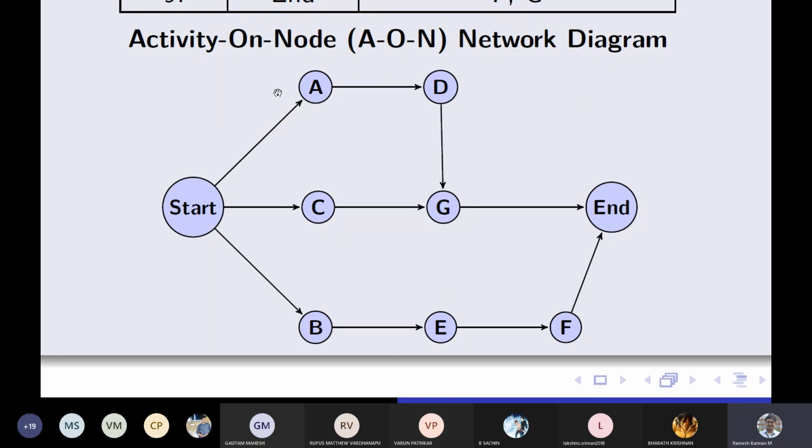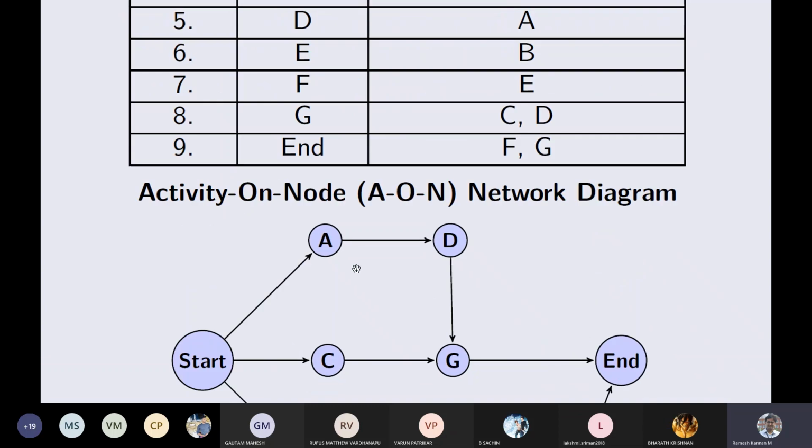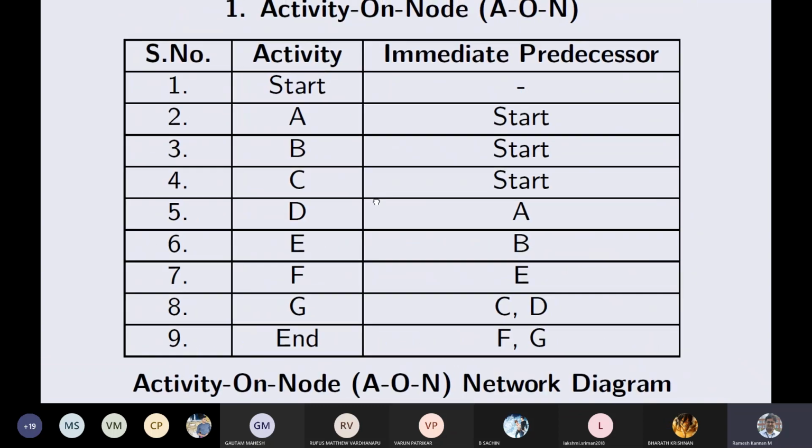So you might be thinking, why is it not B after A, or something like that? So there's a sequence, that is what we call an immediate predecessor, right? Let's take a look at that individually. I'll explain it pretty slowly, and you have to really understand and master this concept. It's very important for module number 4. Immediate predecessor is like a prerequisite. Like, immediate predecessor is immediate prerequisite.